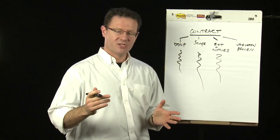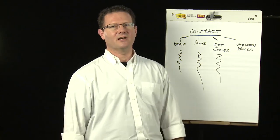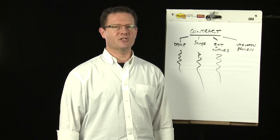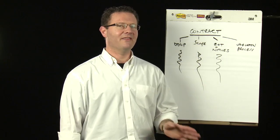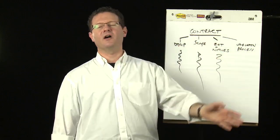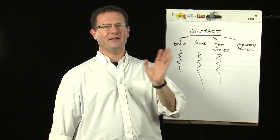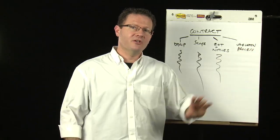Every contract will have a laborious process for getting variations approved. You need to know what those are before you enter into the contract and then you need to stick to them. Now, often your client will waive that and say, no time. Just go and do it. We'll sort it out later.